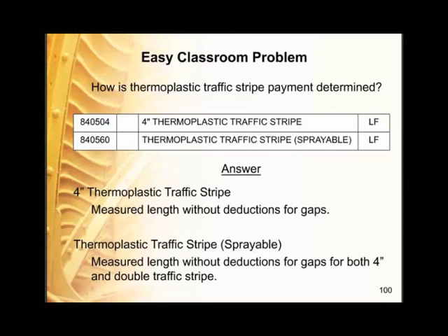You would not know that without going through the four different documents. This example really points out that for any specification interpretation or question, you really must be looking at the specifications in their entirety. You need to be aware of the 2010 standard specifications Division 1, our general provisions, sections 1 through 9. You need to be looking at the 2010 specifications technical section involved. In this case, it would be section 84 that we looked at. You also need to be looking at the subsection of the technical content section, which there normally is. So in this case, it was section 84-2. And then you need to check to make sure there isn't any revision in the revised standard specifications for those sections involved. And last, you need to make sure you're checking your contract special provisions to see if there isn't a project-specific specification.